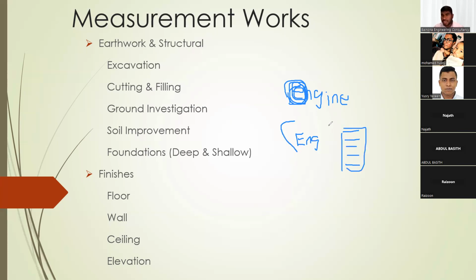The capital E Engineer is the one who is doing supervision and design. So the simple understanding: if you mention the small e engineer, this is for an individual person, an engineer who is working on that site. The capital E Engineer is for the firm. That is not identifying a person, that is the firm. Yes, in our easy understanding, we can say the consultant is called the Engineer, capital E. And small e engineer means we all are engineers, indicating persons. That is the difference. Am I correct?